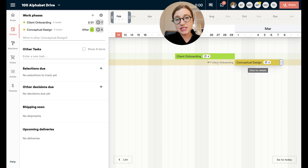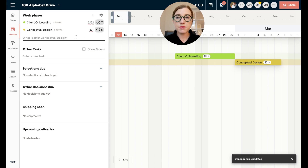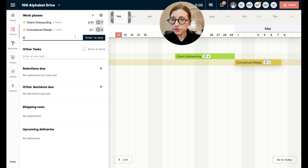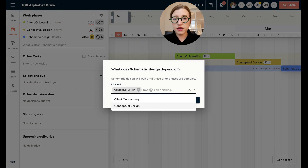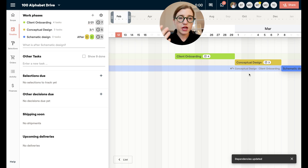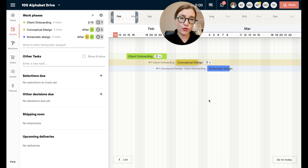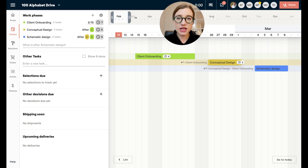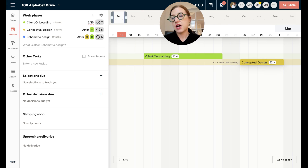You can see there's a little arrow showing that conceptual design is dependent on client onboarding. If you want to remove this dependency so they can live independently, you can do that. You can also make multiple phases dependent on the same phase — for instance schematic design can also depend on client onboarding. As I push and pull them they move together. I can zoom in by shortening this view to look more closely at the timeline.